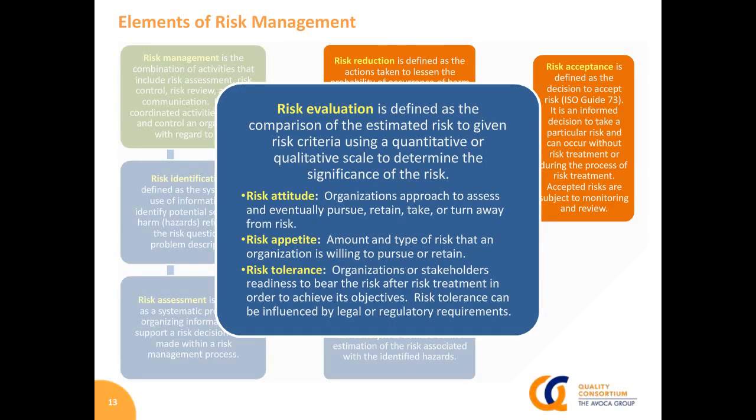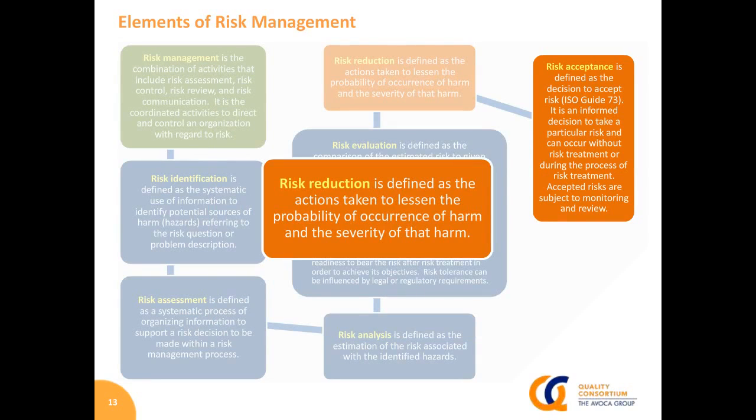On the flip side, it would be rather useless for, let's say, a non-critical path study that is really kind of a peripheral implication. It might be an exploratory thing that is not in the primary registration or primary goals for the program. It's more of an interesting exploratory aspect. It would be inappropriate to take the same risk of enrollment delay forward for what could be costly funding or resources. Therefore, you can understand that risk appetite and tolerance in a diverse, fit-for-purpose fashion. So that evaluation should be important in that context.